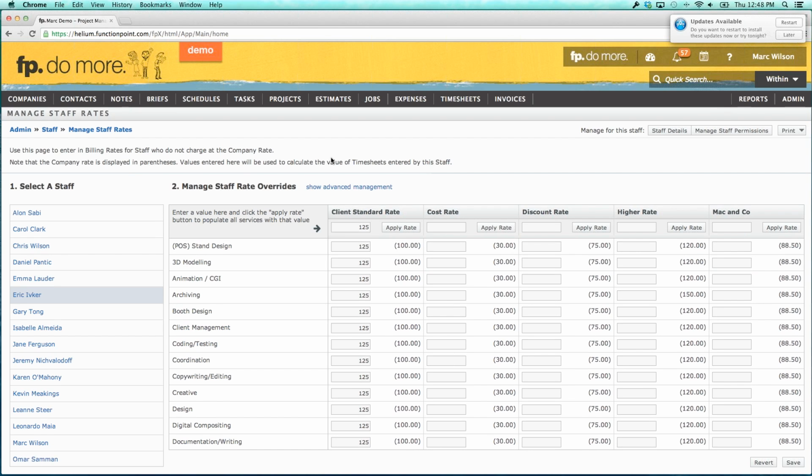I mean, don't stress about it too much. I'll tell you why you shouldn't stress about it too much in a second. But get all the overhead for the company, divide it equally amongst all full-time staff. If you have some part-time staff, if you have a person who's working 20 hours instead of 40, then give them a lower percentage of the overhead. But get all the overhead for the agency, divide it equally amongst all full-time staff.